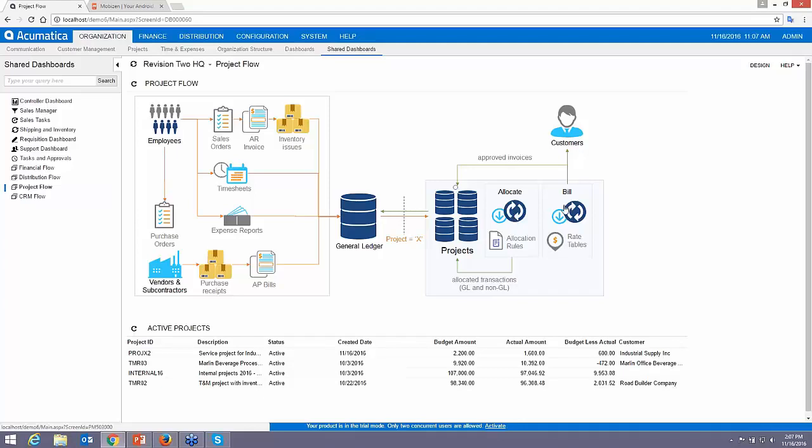The next optional step is billing. Once again, I said you could run internal projects, so if you're running an internal project, you obviously don't need to bill it. But billing can take all of the information that you've allocated, and it can bill based on a fixed rate, based on a percentage of completion, or based on certain billing milestones that you will have. What we're going to try and work through today is an example project that will show you how to take a few of these different scenarios into effect all at once.